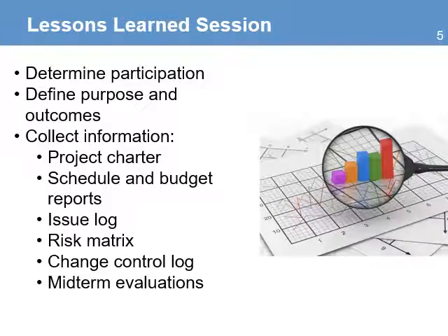The first decision is to determine who will participate. It is important to include key stakeholders that can contribute to the session with their own perspective. You also need to have a clear and simple understanding of the purpose and the outcomes of this session. You also need to identify the information that participants will need to read before the session. This is project information that will help them remember some of the key events that happened in the project.